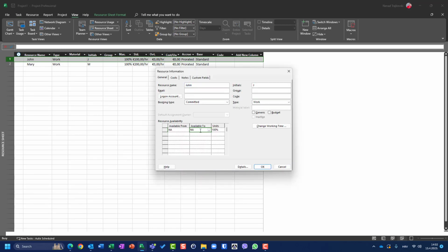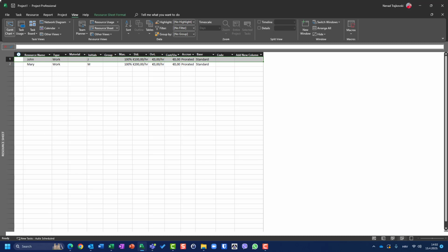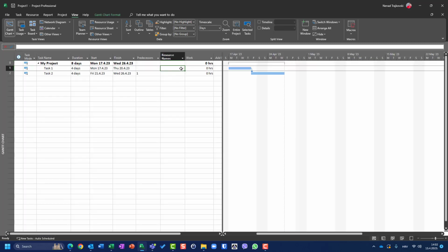John is available until 20th of April 100%, and from 21st of April till the end of the world, he's available 0%. What will you get here if you assign John as expected 32 hours?